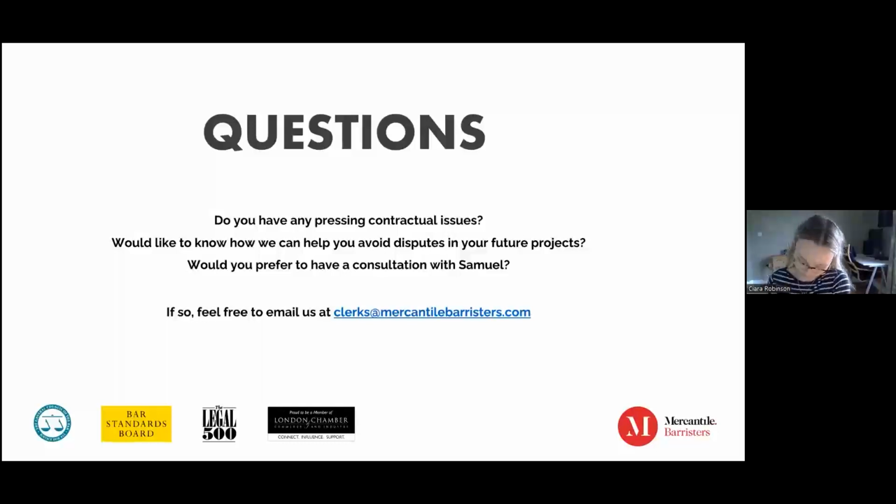You may well include that you are quoting at these rates. Any fluctuation of about 5–10% you will absorb. But above that, you ought to return to them with a view to having that accepted. And it will be advisable to draft a bespoke clause to put to them, depending on the value of the contract.